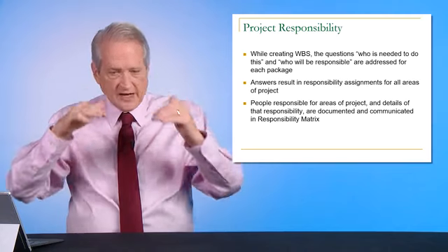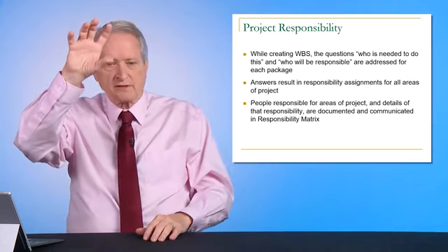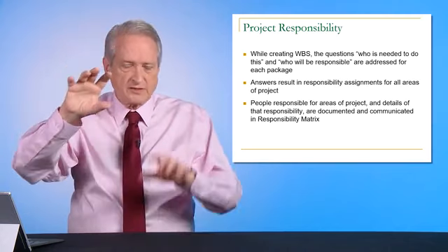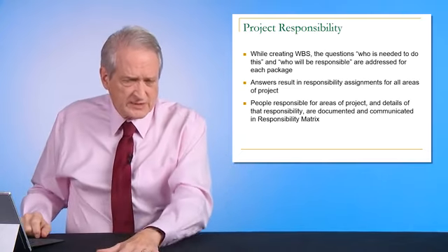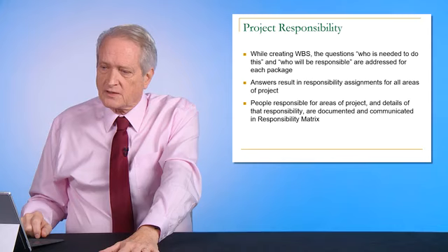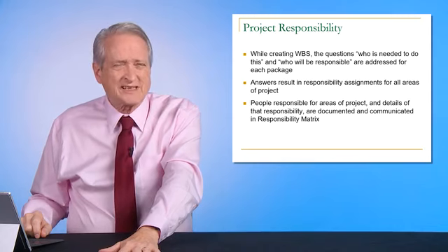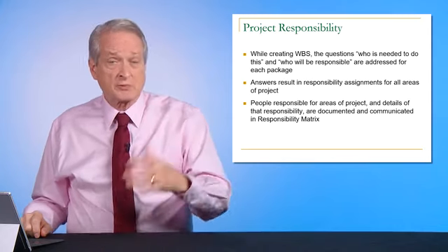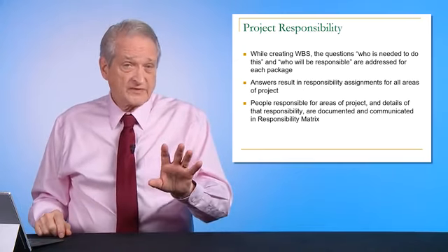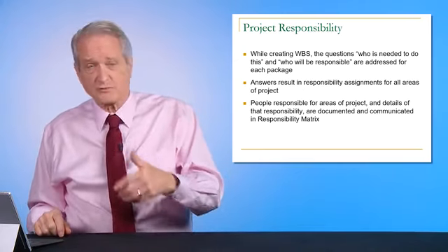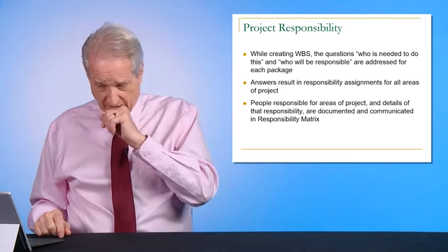You can lay it out in a hierarchical format with a level here and a couple of levels deep. We're not going to do much deeper than this in this class, about 3 levels. Gets too nitty-gritty. If you're doing a big project with 200 or 300 tasks, then you do it. But in this class, we're just going to go through about 3 levels.